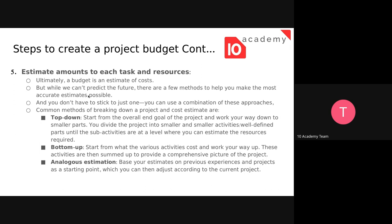Analogous estimation is applicable if you have done a similar project previously. From that previous project experience you can estimate the current project cost analogously. It requires an expert with experience. You base your estimate on previous experience and projects as a starting point, and then adjust according to the current project. These are the methods you can use to estimate the cost for each task or resource.